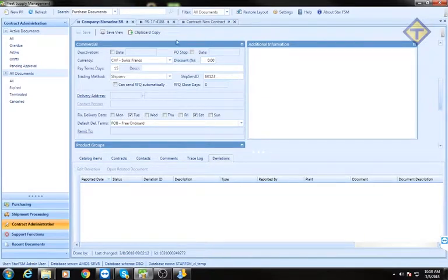No matter the PR and PO, you can create a deviation for a vendor. It can be during the PO process when they delay items or have missing items. When they don't deliver what you expect, you can create deviations from the PO. Or maybe if this guy never replied to the quotes, you can create a deviation. Okay, the vendor never replied to the quote, so maybe you can just reduce his score or block him or disable him, because that's not a good vendor, since he never replies to you guys.